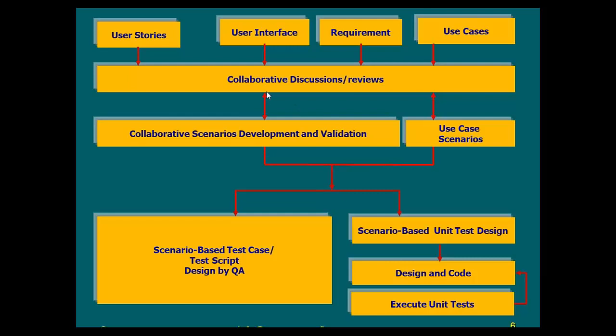And it goes back and forth, as you can see, because as we develop some scenarios, we start validating them, we start having more questions, we ask the questions, and then we get answers to those questions, we add a few more scenarios, and we go and modify some of the scenarios we already wrote and so on. Again, let me tell you that building the scenarios, the discussions and the questions, developing and validating scenarios, all together is 3-4 hours, nothing more than that.